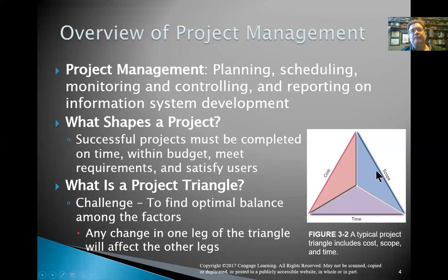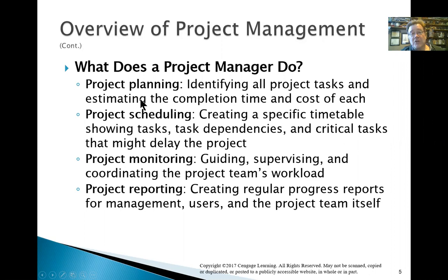So what does a PM do? By the way, just so you know, if you're not technical, many PMs are also not technical. So it's an interesting career path for those of you that maybe don't want to pursue a technical background. They plan it, they schedule it, they monitor and report it. And the key I want to point out with the reporting is that it has to be regular, because if the project starts to slip, you don't want to be the person that delivers the fact it won't be delivered on time on the day that it is due. The further out you are when you realize it's going to slip, the better off you are. So you need regular progress reports for that.